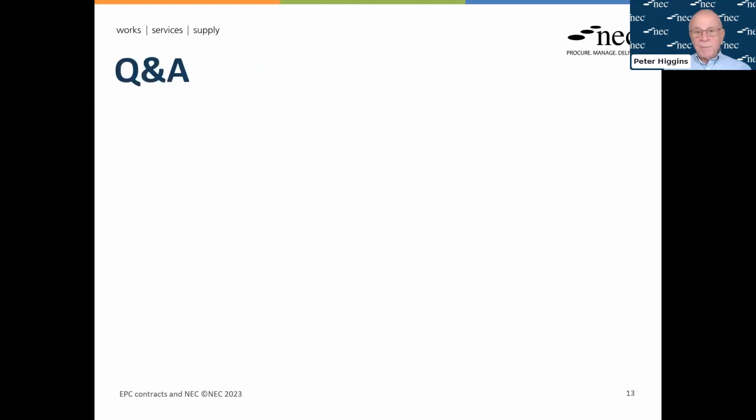Thank you, Shai. We've got a number of questions already on the screen, so people have put in. One question there, how much design can you expect from the bidders at the tender stage? I think to expect somebody to get a really detailed design is a bit extreme. It means that tendering costs, bidding costs are pretty massive, and therefore there needs to be a limit to it. But I guess it's a question of a balance. How much design do you need to have confidence that the contractor you're about to appoint is going to provide you with what you've asked for?